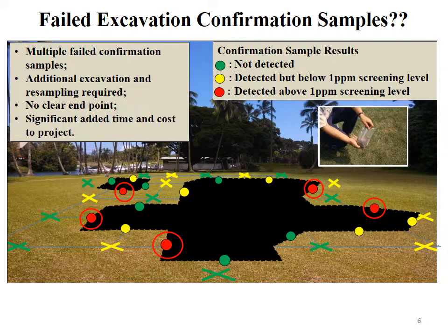If you're dealing with an active construction project, this can be a complete disaster because they've got their budgets already in line, their construction contracts in place and such, and any types of time delays in particular can really mess up an entire project. So it adds significant time and cost to the project. And really time is the bigger factor than cost in a lot of cases.